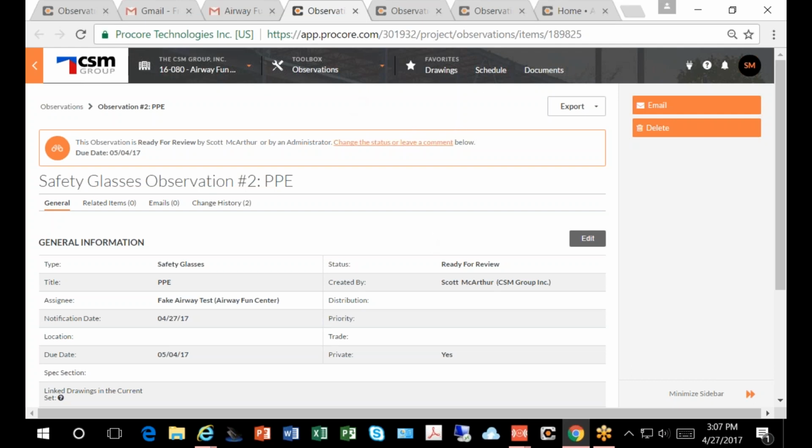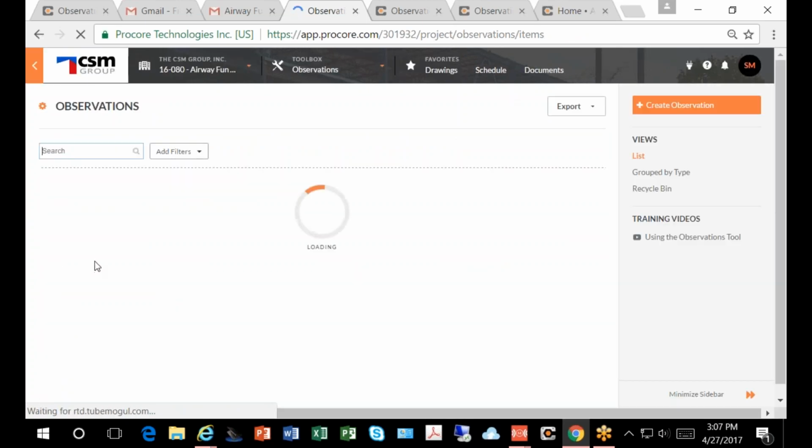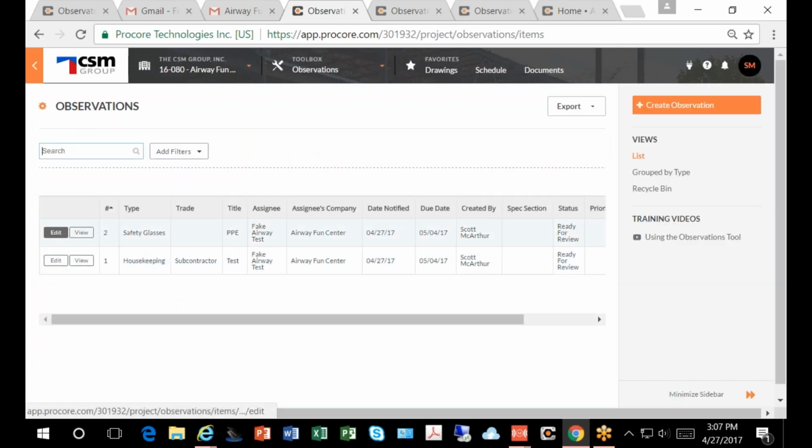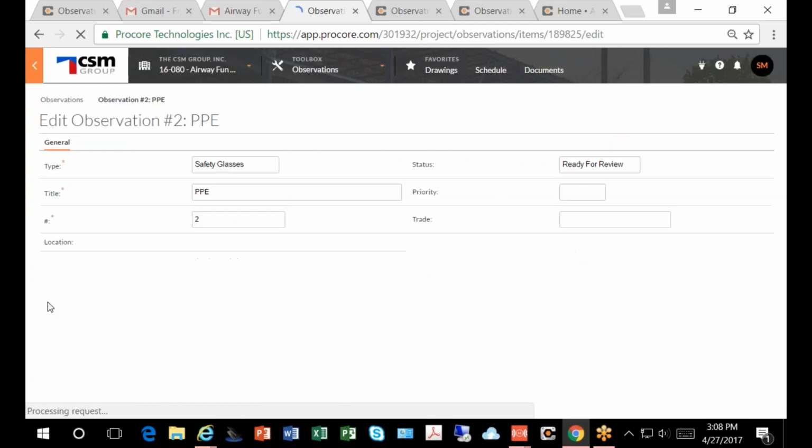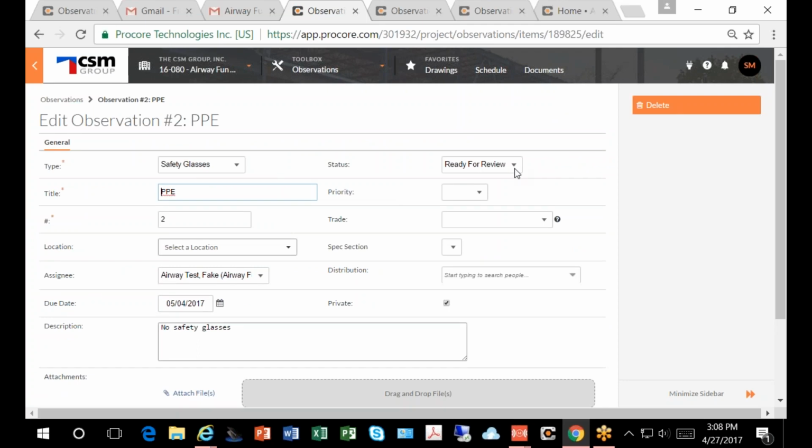So then on my end, I just got an email telling me that that's complete, and I can either go to it from my email, or if I'm in Procore, I see that that status has changed. I can simply come in here, and you can see the status is here, ready for review. I can come in, take a picture, or just close it out and say, yep, that's addressed, all done. So that's one way we're using observations. I guess that's the quick and easy process of how we've been using it.